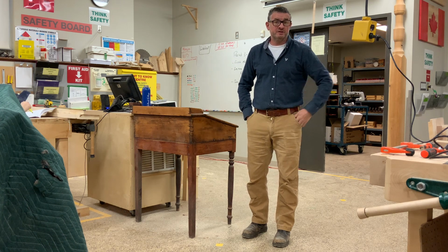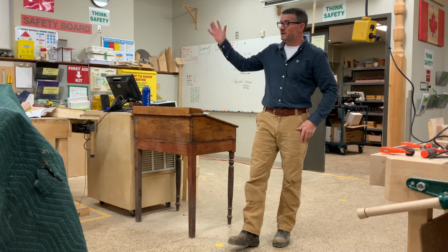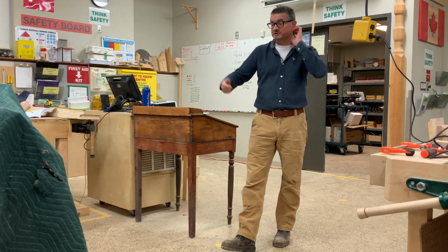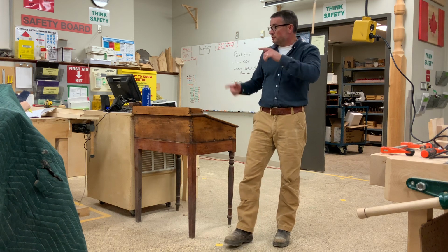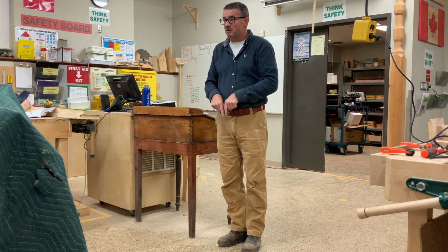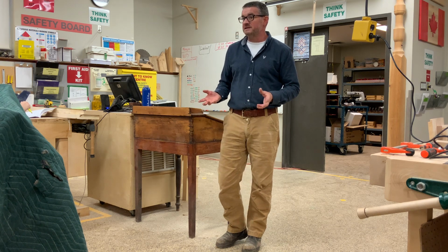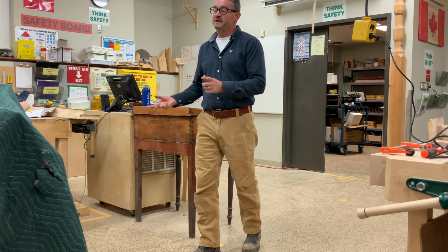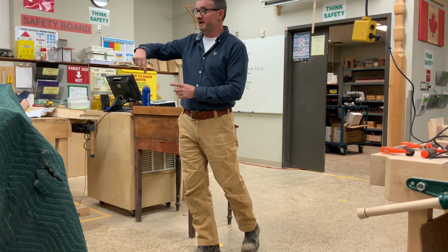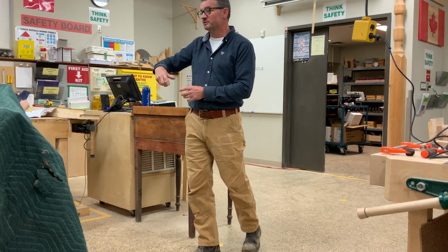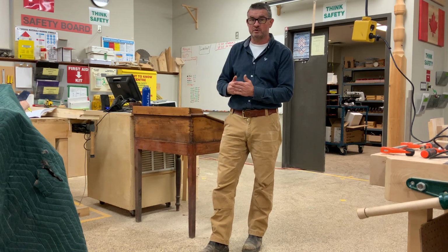So the first thing we're going to do is get rid of all this stuff, then we're going to strip down the walls, then we're going to put in new plumbing and electrical into the walls. So you folks need to show up tomorrow and demo this place. If you don't get that done tomorrow, the plumber and electrician are coming on Monday, so they can't do anything if you don't have your job done first, right? It's all like sequential order.